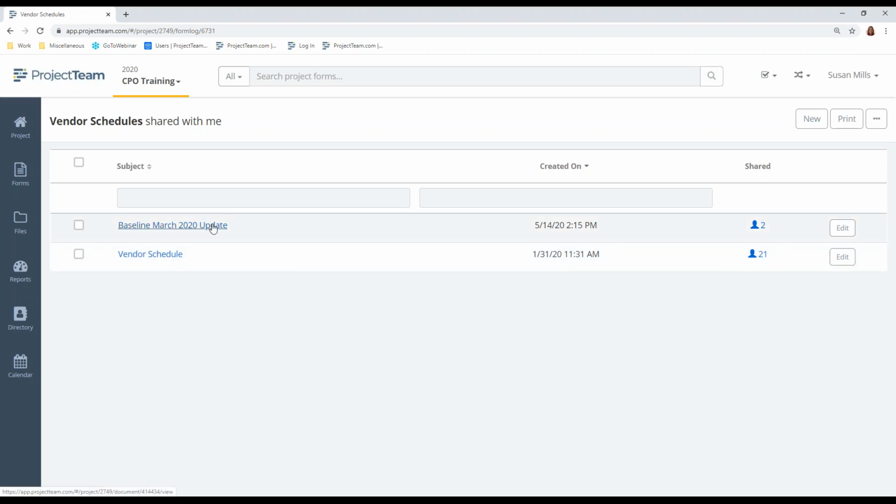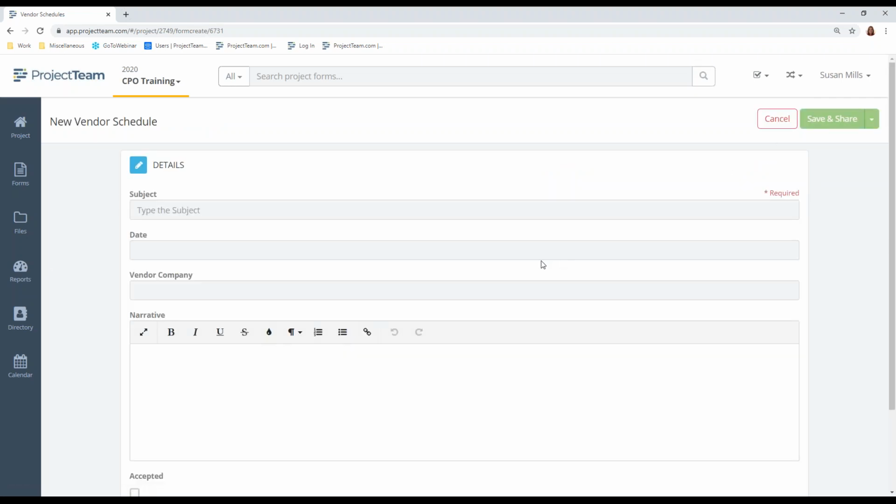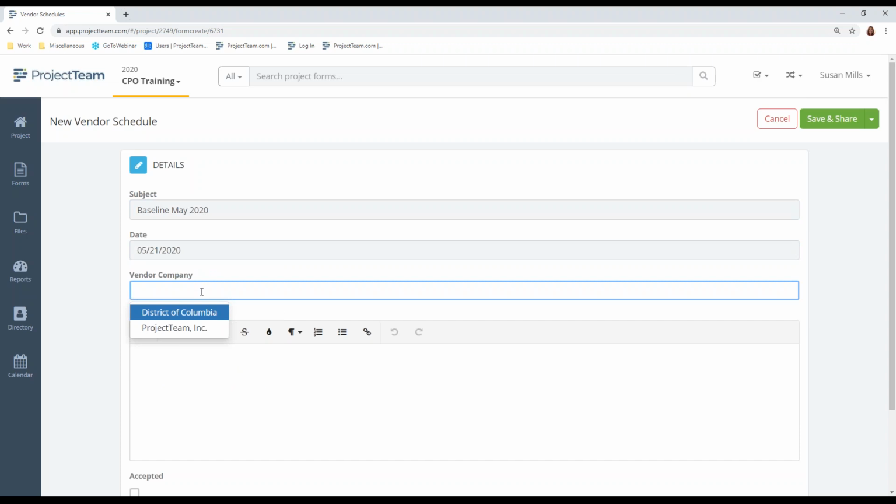So to open one that you've already created, just click the link, and it's going to open the document. To create a new one, click New here, and you're going to give it a title, and the title should include the schedule submission name. So let's say this is baseline schedule or baseline May 2020. You're going to enter a date for the schedule, and then you'll enter the name of the vendor.